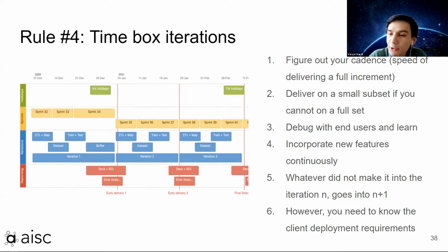Due to the nature of regulated industries like banking and I think insurance, this cadence is probably not sustainable. What you have to do is find out with their IT team how long it takes them to upgrade their systems, usually on the order of months, and sync and align on the scheduling with them. So next slide, please.